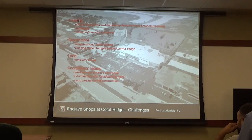Yeah, essentially I hired that company to do a review, an update letter saying everything's all right with the site. Because when you're negotiating with an anchor tenant, you're obligated to provide them those reports to say that you have a clean site. So we're getting it for us as ownership, and then we also get it for them.